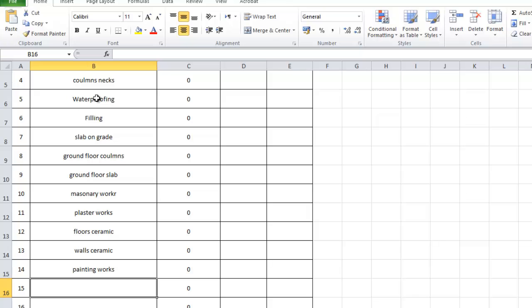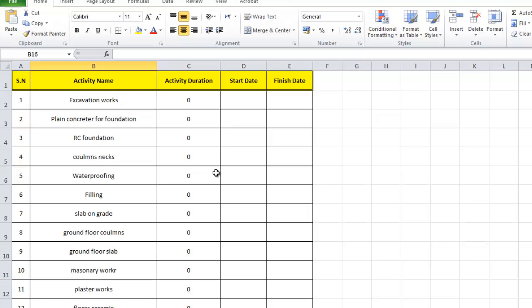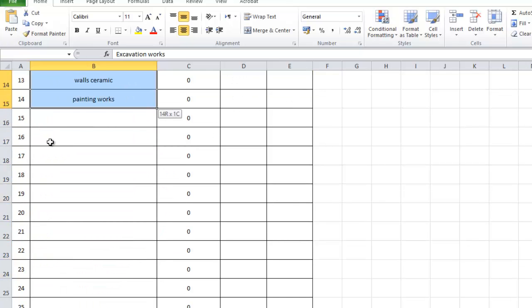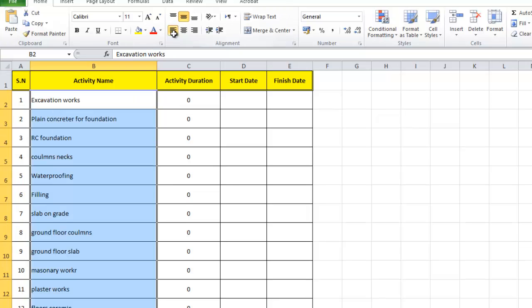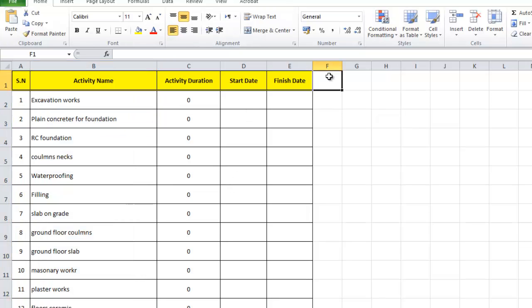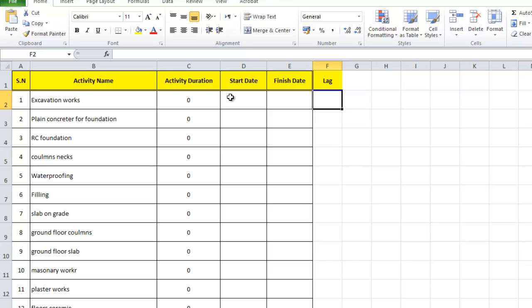Now let's look at how to use Excel to help us as planning engineers. We'll add another column called 'Lag' — lag is the duration between activity A and activity B, either to start or to finish.